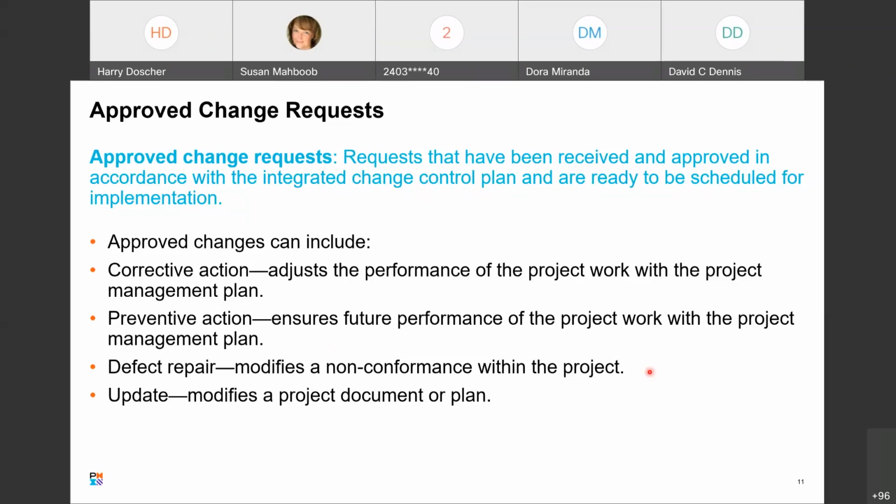So if you identify a defect, depending on the size of the correction, well, any defect would go through your change control process, so that you need to document what you're going to do with minor defects, which defects you're really going to address, and what your service level agreement is for delivering the corrections for your priority 1, priority 2, priority 3, priority 4 defects.